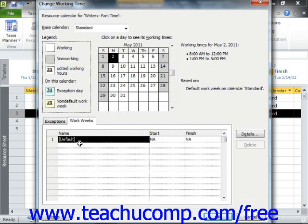If you wish to change the default work schedule for this resource for all weeks in the project, you can select the default row on this tab first. If you only want to set a work schedule for a specified range of time, then click into the next blank row instead. Then enter a name for the range of time into the Name column, and use the Start and Finish columns drop-down arrows to set the start and end dates for the work schedule. The work schedule you create will only be used during the dates selected; during dates outside this time, the default schedule will be used.